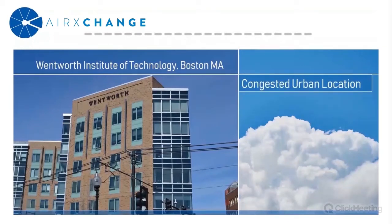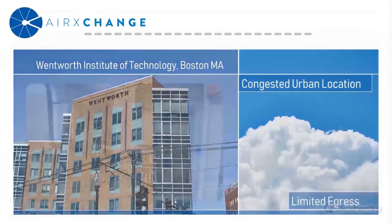One of the biggest obstacles is the building itself was located in downtown Boston, in a very busy section of the city. If you're from the area, Boston's busy everywhere these days, but due to the traffic, the equipment had to be light enough and compact enough to be offloaded quickly. And a crane was completely out of the question. It would have just blown the budget completely out of the water.